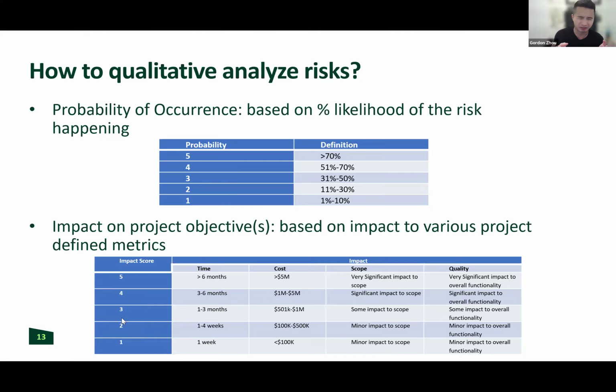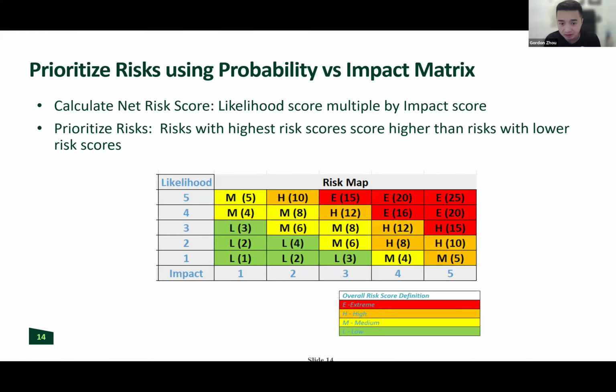So now you're going to ask me, okay, well, how does this help me? How does it allow me to compare between different risks, right? If each risk has 2 scores, how does it help me compare and prioritize? Well, it's actually very, very simple. This is a 2x2. Each risk has 2 scores, one for probability, one for impact. What we do is we simply multiply it.